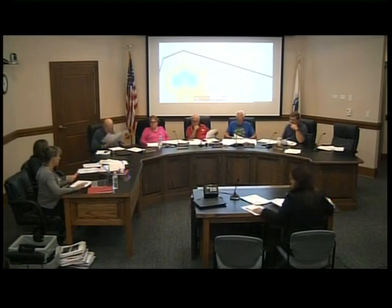I noted to Maureen that it was my fault, but I did not make them file the after-the-fact filing fee because the pool got farther from the wetland. I just had them file the modification and showed that where the pool is, even though it's slightly bigger, it was practically at the 100 before. They had actually constructed the fire pit area, or graded it, so that was after the fact also, but they hadn't constructed it yet, so that was also in the modification. At the time, they had told Maureen that they were going to remove the pool house as part of these things. But as you can see, they've kept the pool house on here, and I didn't get to look at this until today.